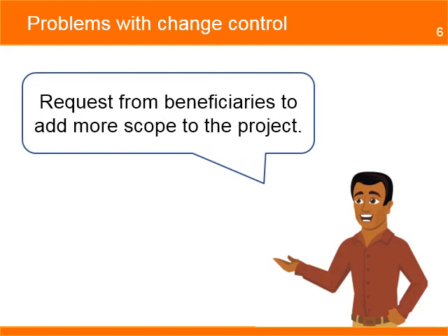Another team member confirms the additional requests from beneficiaries to add more buildings to the project, especially a request for a social center. Some beneficiaries seem to have the expectation that the project will help them rebuild the entire village, including the school, a small health center, and a market to sell fish. Some also report confusion on the type of construction and the use of local materials, and are still not sure who will provide utilities such as electricity and water to the village.